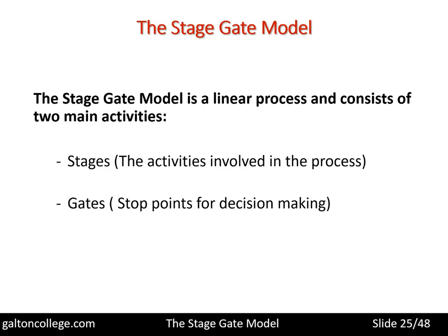Having tested it, stop. Stop and evaluate. Evaluate whether it passed or whether there were issues, or check it out. And add that to the decision process. And this means it goes forward or it doesn't. So the gate is a stop point. It stops everything whilst the decision is made. So we have stages and gates.